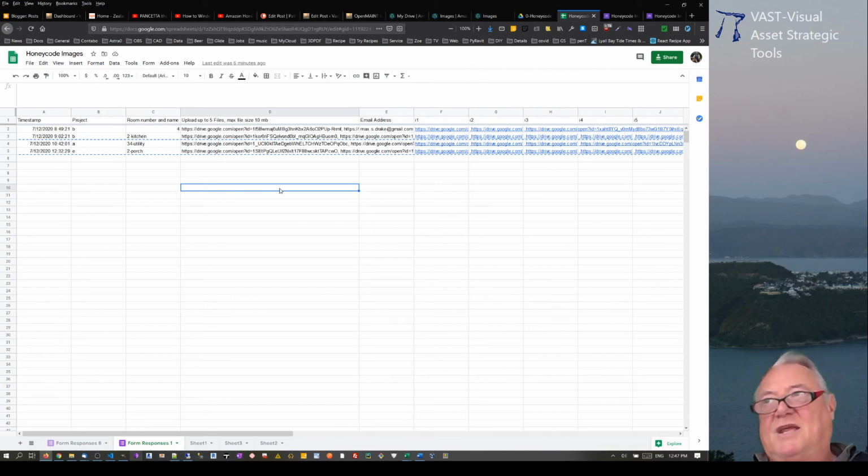Sorry, I was actually talking about the defects list. So I had a defects list, and the project manager was controlling this. Anytime anybody found a fault, they'd send him an email with a photo of, oh look, a tap's broken. The rest of the team would have the app, and he would then put that defect on there, and it would show the photo of the defect.